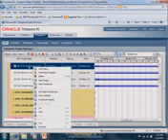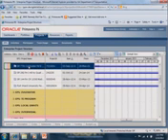So a use case for that would be if you're making major changes to a project, maybe to the logic or to something else, and you don't want other people in there actually making updates to the project while you're doing that, you might want to open it in exclusive mode. And you're going to be able to toggle that for only certain people being able to? Yes. Yeah, so there's a security privilege for that says who can open a project in exclusive mode.